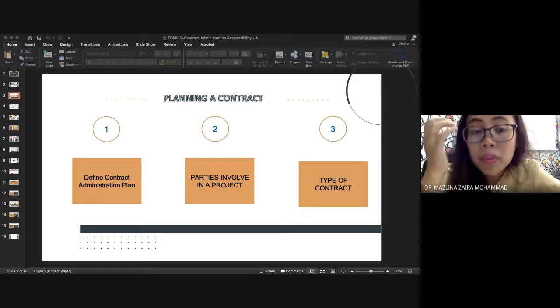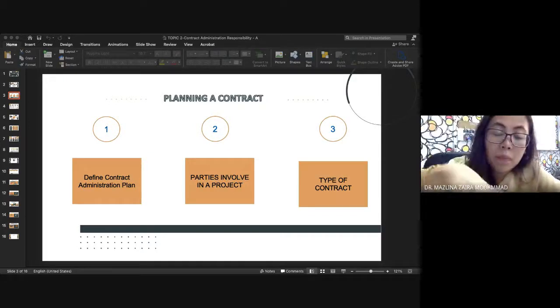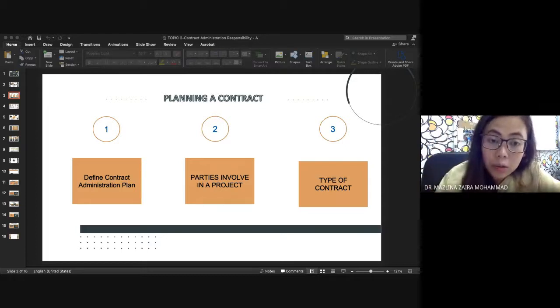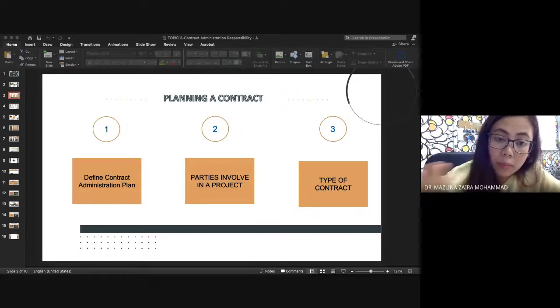Who else? When they want to build at that place, who is the party? Like you say, authority. Whose place is it? Even in Selangor, who is that? Majlis Perbandaran, the state government authority, Majlis Perbandaran Shah Alam, MBSA. If you want to build in Shah Alam, you have to deal with them. You must get approval from them, and they will also see the progress of that project. You have to update them once in a while.